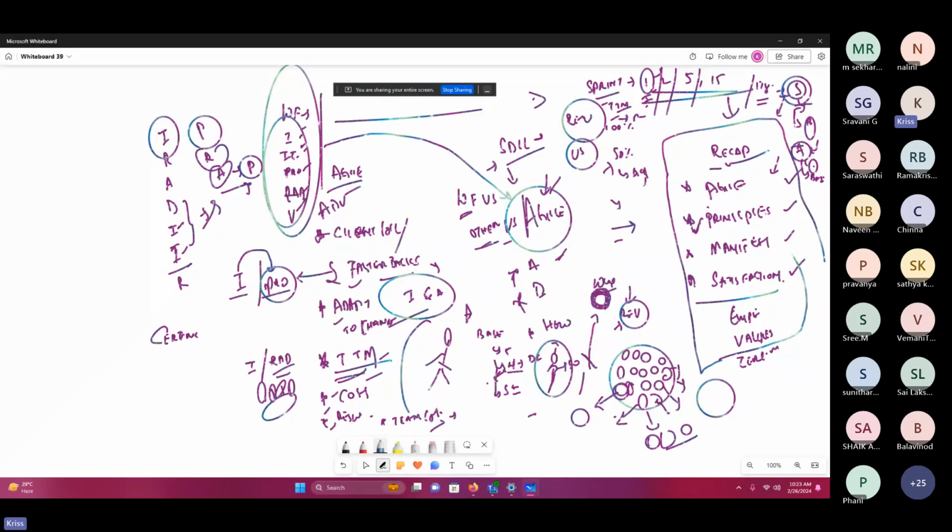Now here also, what would be the sprint deadlines? Facebook implemented within 1 day, but certain companies will take 15 days based upon the maturity and the level of implementation of the sprint. If the procedure and process are well matured, then 1 day would be enough for them. It depends on the company; they will change this sprint life cycle. Some people adopt 15 days, some even adopt 30 days.